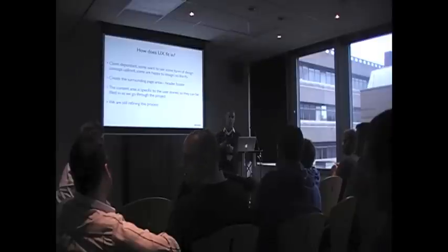You're trying to nail us down to this price, so we're going to whack 30% on the price because you're trying to nail us down. We're going to get all the risk. Therefore, our costs are going to go up by 30 or 40% to cover the risk of this project. If you want to work nicely, it's almost time and labour, but that's a better way of putting it. But some people would rather pay the money.